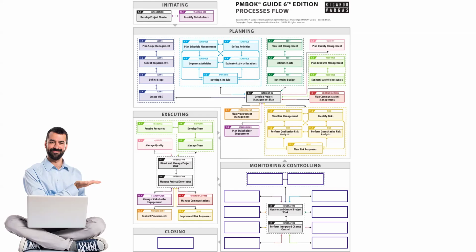And the other process is for any change requests which may result in amendment to the baselines, where the baselines may have to be recreated or reapproved. That can only happen if the proper change control procedure is followed. Anyone who requests a change, all these change requests will land in this process, and those will be properly processed and presented to the board of directors, the project board, and they will decide whether this change is allowed or not. And if it is allowed, then the relevant plan, the project management plan, can be amended accordingly, the baselines can be amended, and from this moment onwards, the new plan will come into effect in execution.